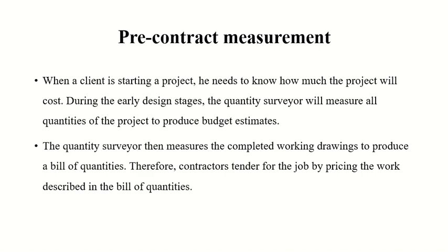Okay. When the client is starting the project, he needs to know how much the project will cost, because he is supposed to pay, right? This is his main job. So he cannot assign any budget until he knows how much is required. So during the early design stages, the quantity surveyor will measure the quantities to produce an estimate of the budget.